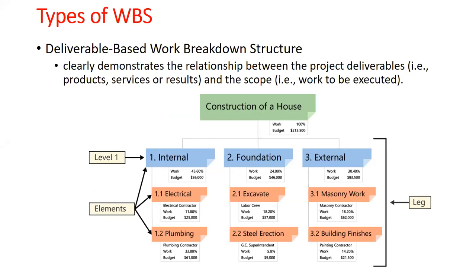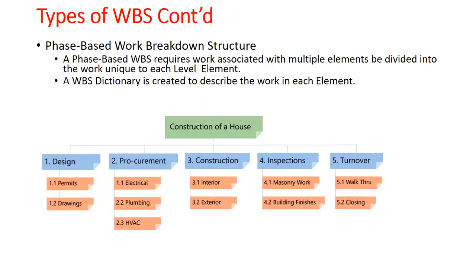Now, the WBS by work package, using this phase as a case, simply means that instead of stopping at 1.1 as the last work package, you go further to break 1.1 down. So 1.1 says permit. Then 1.1.1 could be identify all the permits to be gotten.